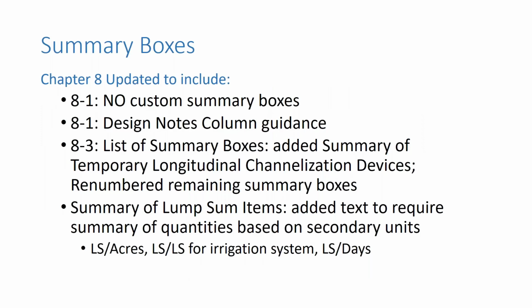Some of the highlights in Chapter 8, we want to make sure that you understand that we do not permit any custom summary boxes. You cannot create your own summary boxes or rename the summary boxes. There are some allowances for removing unused columns, but we want to ensure that we never remove the construction notes column, as we need to have that available for those in final estimates or inspecting quantities out in the field.